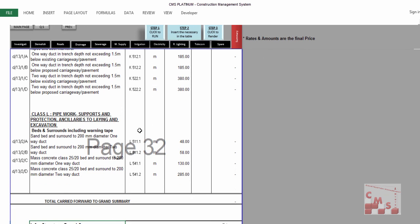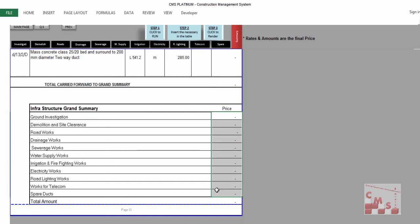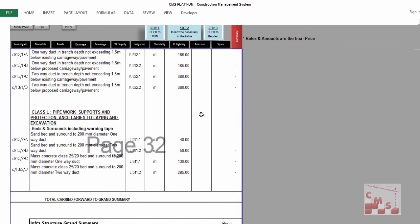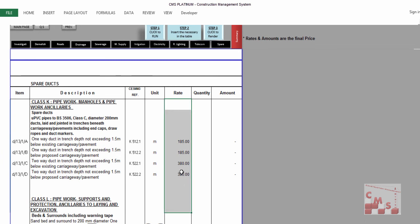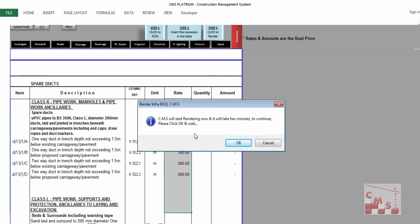At the end there is a summary showing prices for all divisions and the total price. Remember, this is the final price to be presented to your client, so the rates must include your overhead and profit. After adding and modifying what is required — no need to delete unused items — proceed to Step 3: click to render. At the end you will have a full BOQ.